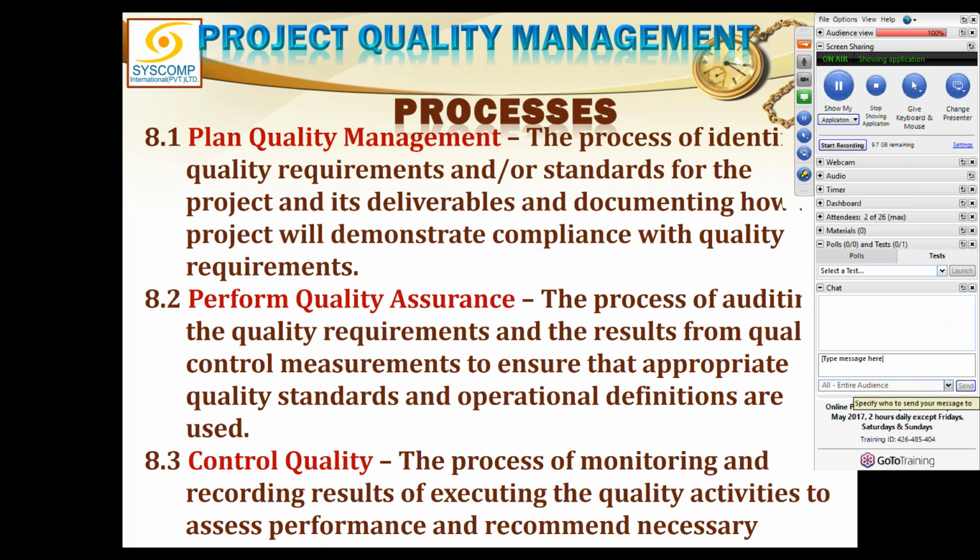So again, at this point, we will turn to the process improvement plan, see how the documentation is done, how the processes are recorded, and record them. And then what? After you have recorded the processes, you have to communicate these processes to all those who are working on them, train them and make them able to understand how this job is to be done exactly according to the documented process. Then you have to see whether they know what processes they have to follow. And for that naturally you may have to ask them questions or give them some quizzes or something.